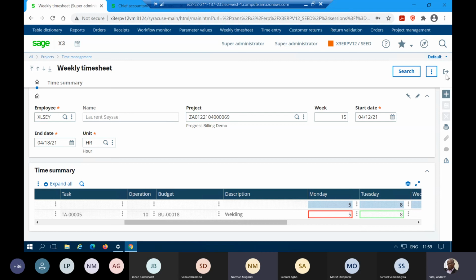It can be the same value, but remember, this is progressive billing that you are doing. So at the end, that's why we selected the invoicing term as 100%. The percentages that we are putting should add up to 100%, and it should tie up with what is on the project that has been budgeted. Okay, maybe I'm not answering your question. I see there's a hand raised there.